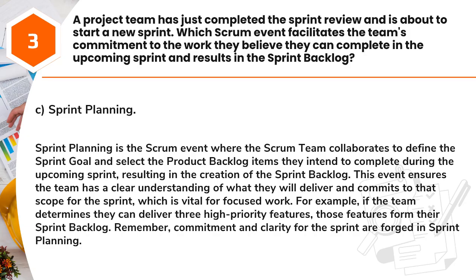For example, if the team determines they can deliver 3 high-priority features, those features form their sprint backlog. Remember, commitment and clarity for the sprint are forged in sprint planning.